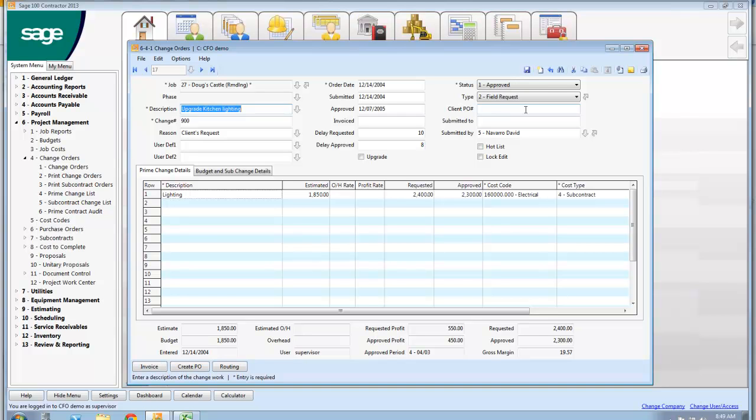You make money by making sure that if there is a change in the scope or a change in a contract or change in things that have to be done, a change order is required, and you get it in and you get it priced out, you get it approved, and then you can bill it. I hear a lot of stories when the guy says, oh, I bill everything, and I know they don't. I know they miss things. And so long story short, this is the job.